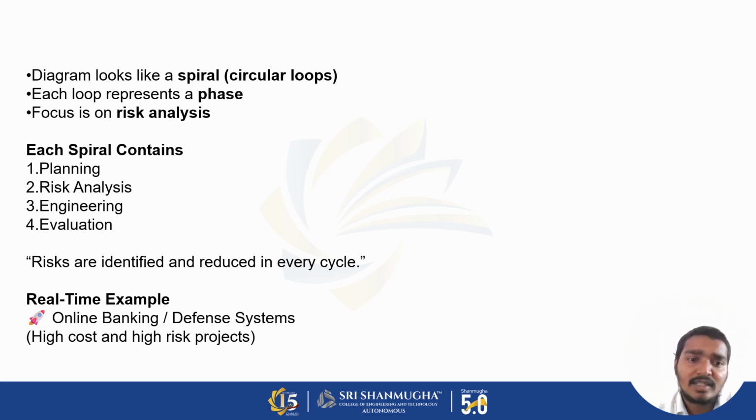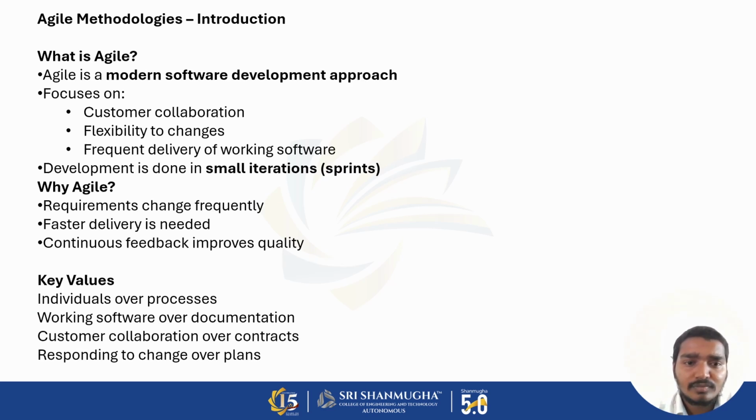The focus is on risk analysis. Each spiral contains planning, risk analysis, engineering, and evaluation. Risks are identified and reduced in every cycle. So the real-time example is online banking and defense systems. These are high cost and high risk projects.